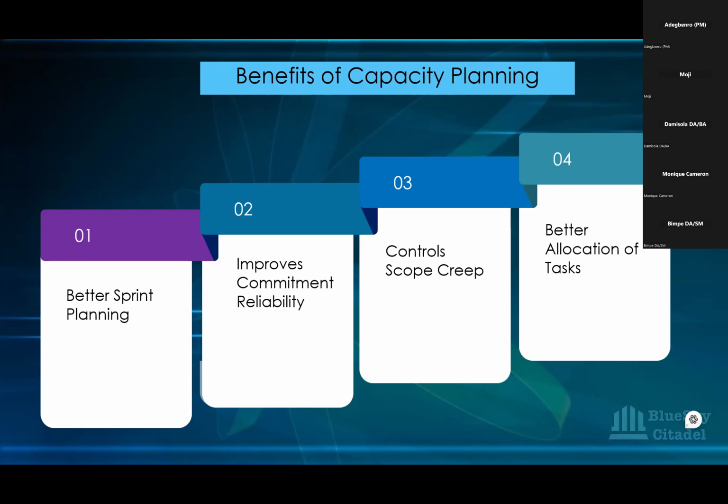Do you want to bring that particular work item in prior to that time so that it is dealt with by that person before they go on holiday? Or do you want to allow the tech lead to be aware and then to upskill another team member, so that when this person is on holiday, another team member is there to do it?